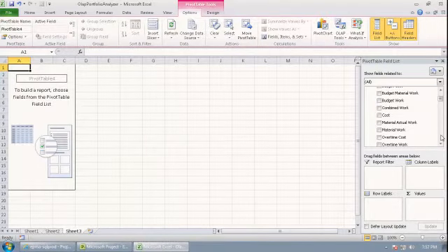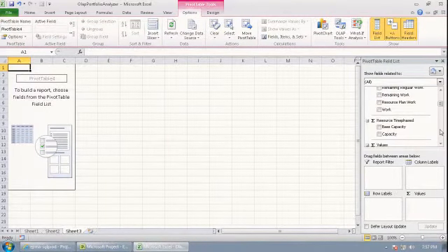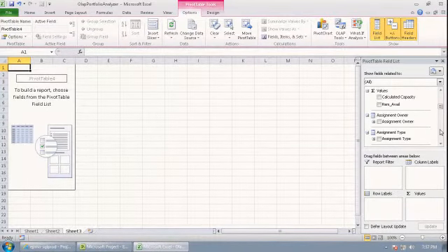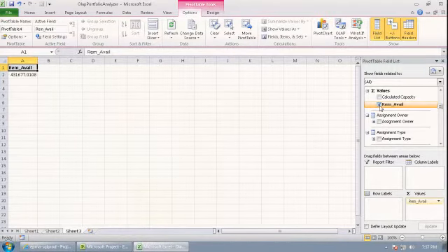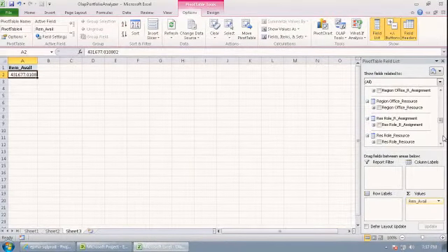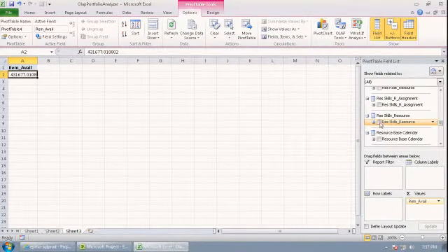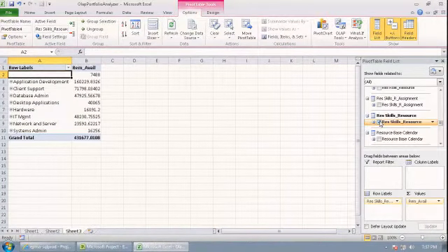It's actually quite easy. So if I look down through my pivot table field list here again, I'm going to add that field of numeric data that I'm going to break down. There we go. There's rem avail, short for remaining availability. That's available in the system. I'm going to break that down by resource skill. Very similar to what we saw with how much work was assigned to each generic resource, we've got how much remaining availability the non-generic resources are going to have.